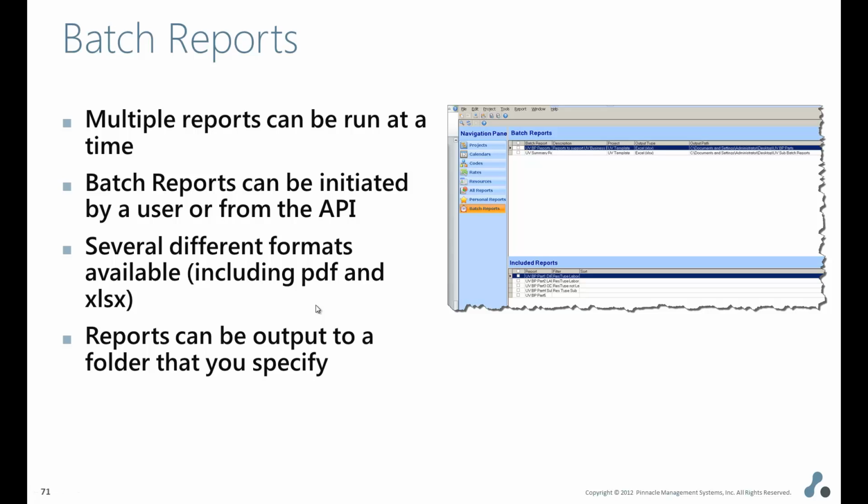So using this facility, if you've arrived at a standard reporting package for your project or maybe for multiple projects, then you can set up that list of reports and run all those reports from the Cobra user interface or from a server-side process that's running at a scheduled time. And that server process could place those reports in a SharePoint folder, SharePoint website, or somewhere where users can access those reports.